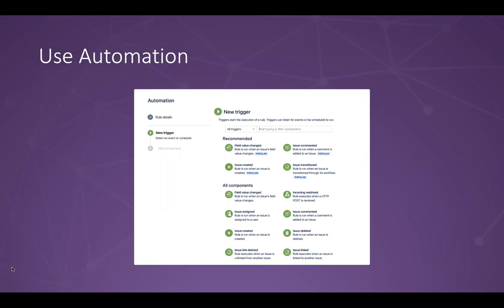And so rather than giving someone access to the full fire hose and giving everybody the ability to say, oh yeah, send a notification to all the watchers of this issue every time somebody updates something, be judicious. Definitely send the notifications, but only when there are important updates. So changes of assignee, changes to due dates, definitely important information. But maybe those things don't really matter if there is no change in, for example, the assigned sprint date for the story, in which case we're not really talking about information that impacts the greater organization because the due date moved from Tuesday to Thursday.